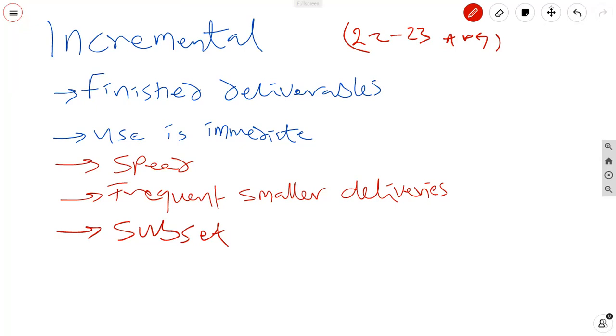Providing a customer a single feature or a finished piece of work is an example of the incremental approach. For example, builders may want to show a finished room or floor of a building before they continue with the remainder of the building. In that case, they may complete a floor with fixtures, paint, and everything else intended for the finished floor before proceeding to the next floor.